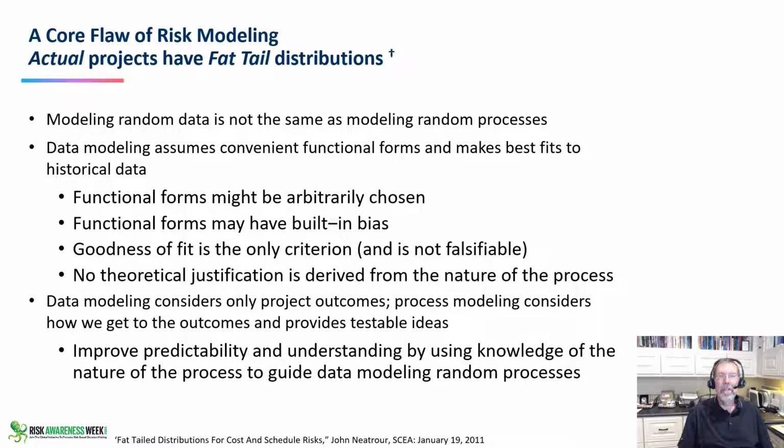And by the way, the Gaussian distributions, when someone says there's a normal distribution, that only occurs if each variable in the distribution is independent and identically distributed. It's called IID. Air molecules in a jar that you're boiling to make steam are identical and independent. Nothing else on a project is identical and independent. So when you see symmetric Gaussian normal distributions, those are never true.